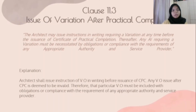Clause 11.3 - Issue of Variation after Practical Completion. The architect should ensure instruction of a Variation Order (VO) is in writing before the issuing of the Certificate of Practical Completion (CPC). Any VO issued after CPC is deemed to be invalid. Therefore, that particular VO must be included with obligation or compliance with the requirements of any appropriate authority and service provider.